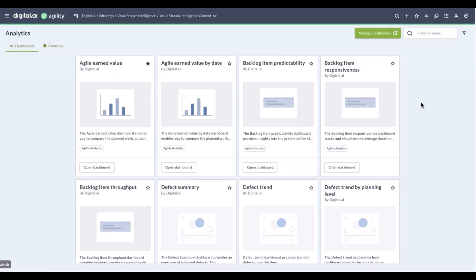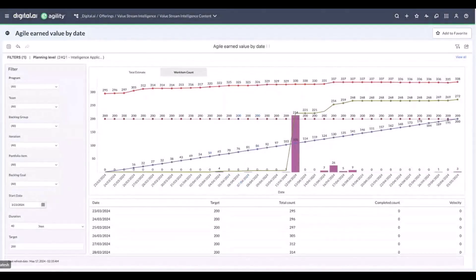Now we're going to show you a few of the popular dashboards customers use on a regular basis. We've pre-loaded the dashboard for the purpose of this demo. Here you can see agile earned value by date. This dashboard has two variations: total estimate of the release plan compared to the actual work completed, and work item count.